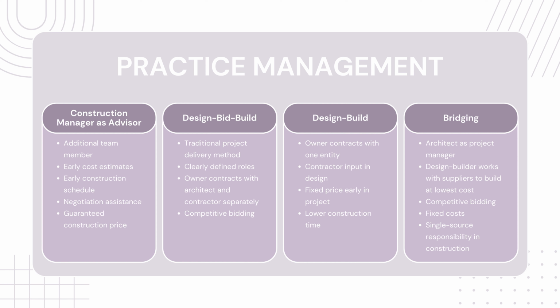Bridging combines design bid build and design build. This method has an architect as the project manager who also helps the client develop the project requirements that will then be given to the design builder. The design builder is able to work closely with manufacturers to develop the project with the lowest cost possible. The owner has representation throughout the project, competitive bidding, fixed costs, and a single source responsibility for construction.